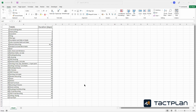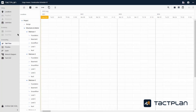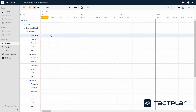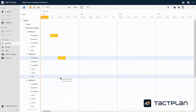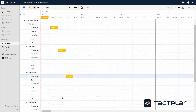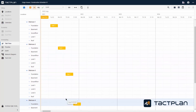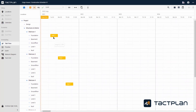It is possible to add tasks in all schedule views, and it's individual from schedule to schedule where it makes best sense to add them. To add a task in TagPlane, please follow these steps: click on Add Mode. Here you choose between Add to All Locations and Add to Selected Locations. You start with your first activity, Sheet Piling. This should only be on Foundation. Therefore, select Add to Selected Locations.